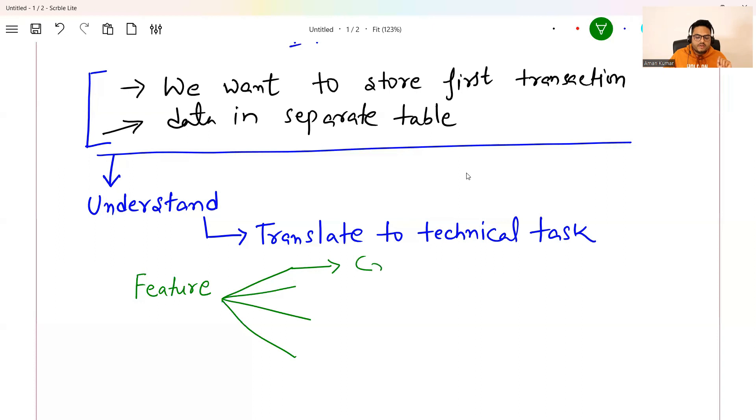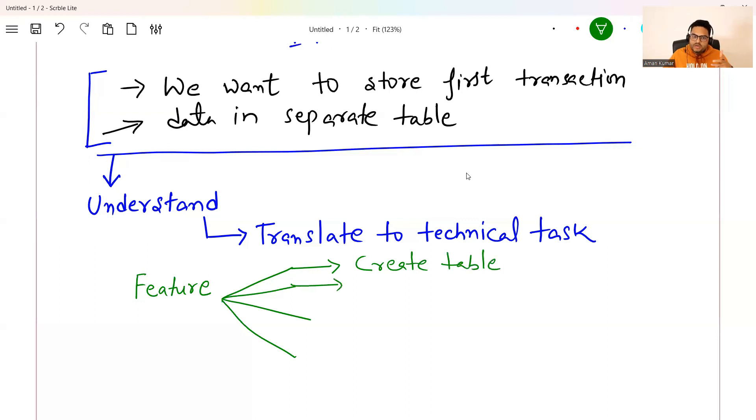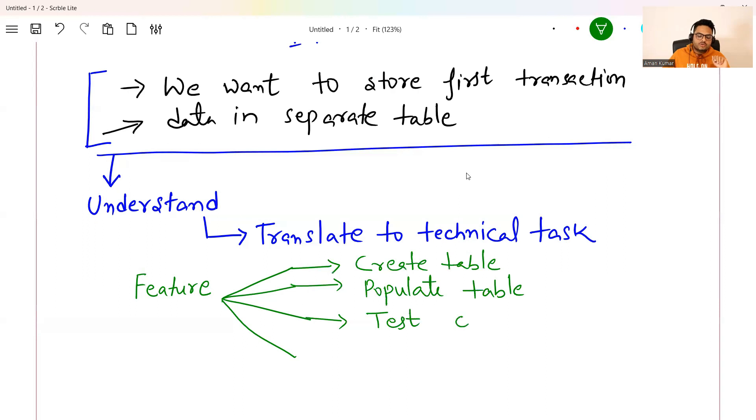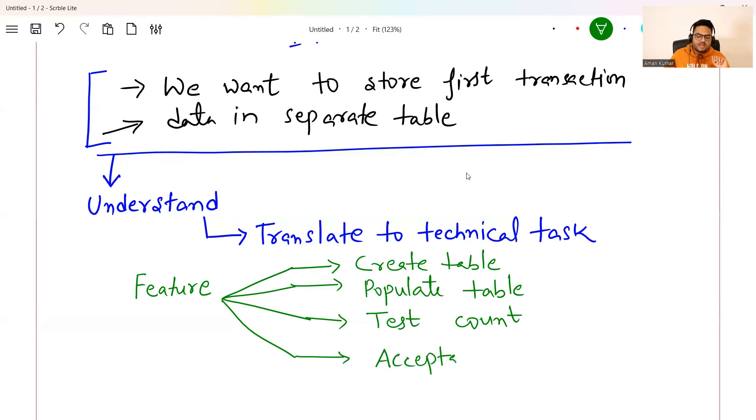So I'm explaining to you how BA will think because we are understanding from BA's point of view, right? So first story that BA can create here, I'm just giving you some example, is create table. This will be the first story. The second story that BA can create here is populate this table. Whatever table has been created, populate this table. All these are requirements up to here build or development has not started. Then they will say test count, test count from some source or somewhere you are bringing, right? And then they will say acceptance testing. I am just giving you few stories. There can be more stories on this acceptance testing.